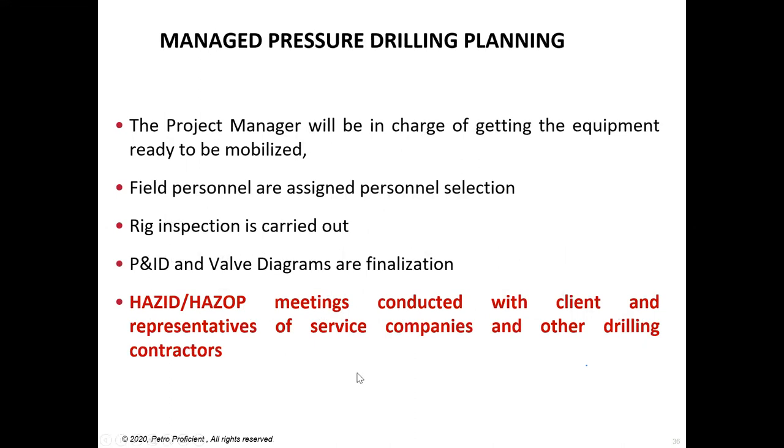The project manager will be, as I just said, in charge of getting the equipment ready to mobilize. The field personnel are assigned, operators and supervisors, who know about this area and have been in the field for some time. Then the rig inspection is carried out, and the P&ID is developed. We will see a P&ID.